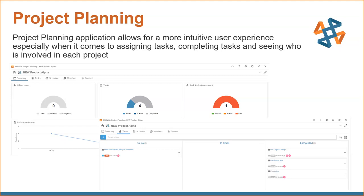Another question: can you assign tasks to a group so anyone can pick them up? You can assign tasks to a group, but a more convenient approach is to label tasks by role — project manager, CAD manager, drafter — and then use the resource management portion to pull from a resource pool. It will find under-allocated resources in the pool that match the required role and automatically assign them to your project.